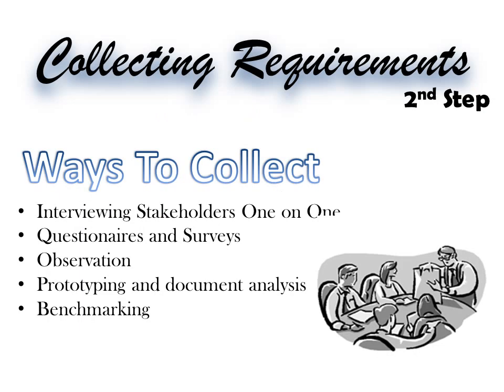The second step is collecting requirements. This is often the most difficult because if you don't define requirements well, it will cause rework that will be time-consuming, up to half the project cost. And there are several ways to collect requirements: interviewing stakeholders one-on-one, observation, benchmarking, questionnaires and surveys, and prototyping.